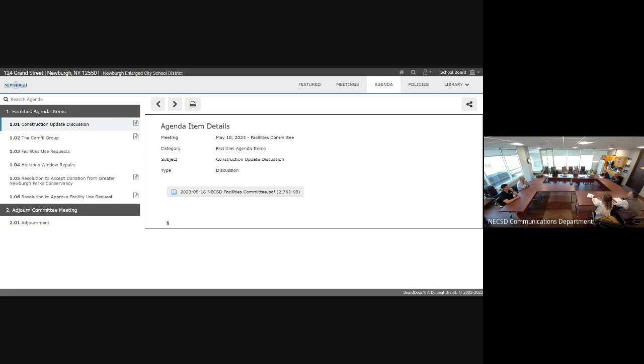There will still be a process of an addenda where we'll have to respond to comments that come out of that, but having that face-to-face review is probably the quickest way to get through the review. Pages and pages of questions. Well, what they'll do is they'll go through, and if they don't understand something, they'll ask a question. If they just asked it direct to us, we can direct them to where they can find it. It's just a quicker way to get through things.